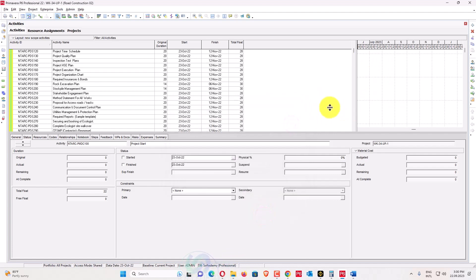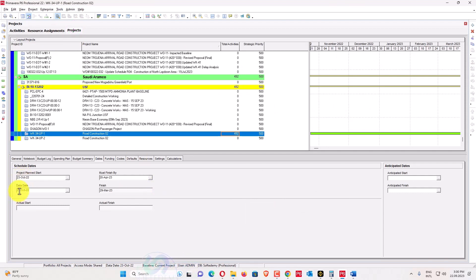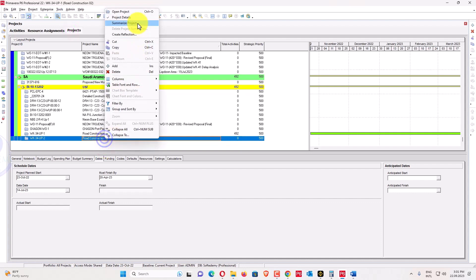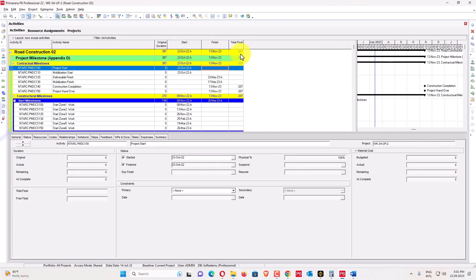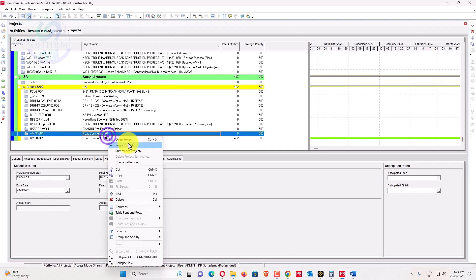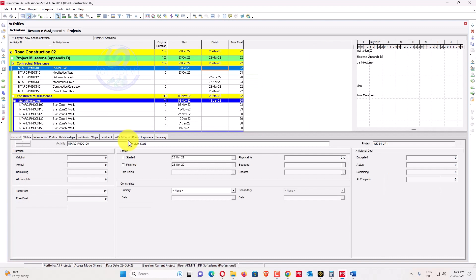After scheduling, you can see the planned dates are restored. My must-finish-by date is 20 April and my finish date is 29, giving about 28 days of float. This is my baseline. Before this process, the updated schedule had a negative float of minus 171 days — you can see that in the copy of the other schedule. People sometimes find negative float alarming, but there is a different concept behind total float calculation which I will discuss in a separate video.